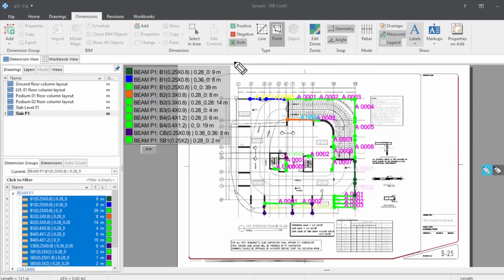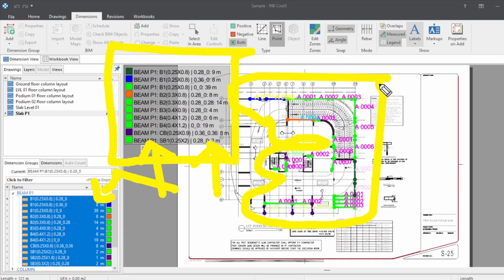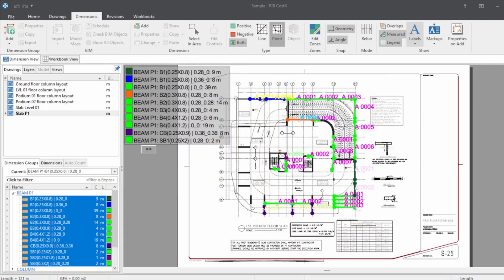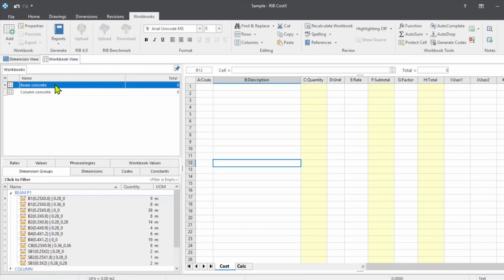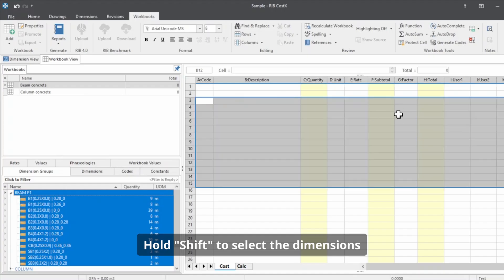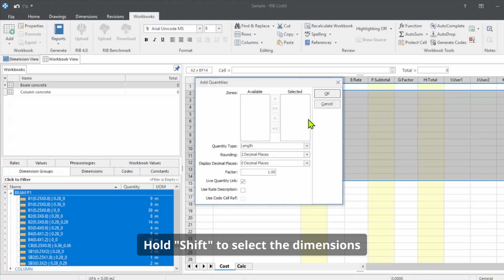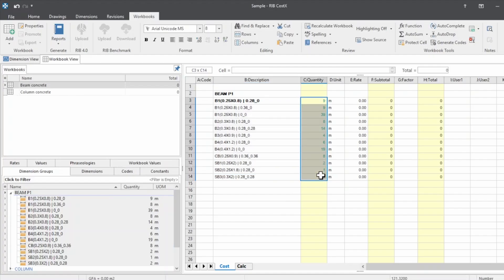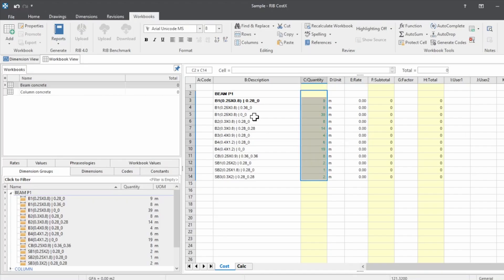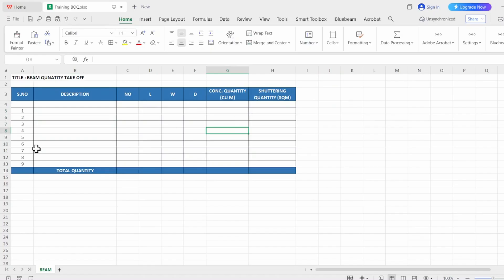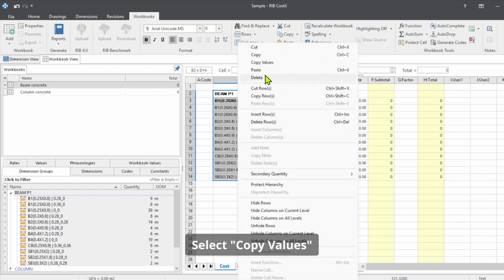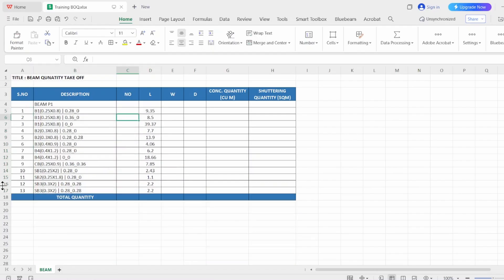Now you can notice the legend, so you can notice the beams which are marked as per the schedule. Now let's move on to the takeoff part with the measurements we have done in the CostX. Click on Workbook. I already created a beam concrete. Select everything, drag and drop the quantities. That's it. Now we have got the quantities here. So these are the quantities we have marked from the drawings. Any changes in the markup will be reflected here—the quantities will be reflected—but we're going to take the data to the external worksheet for our takeoff purposes.